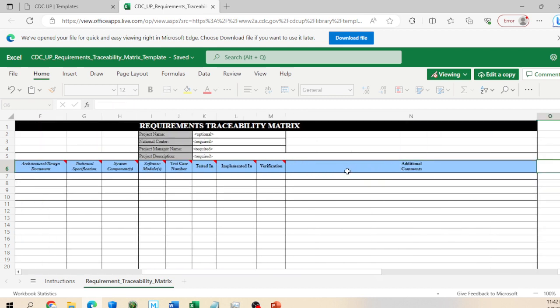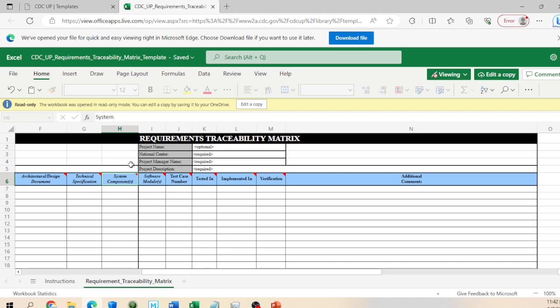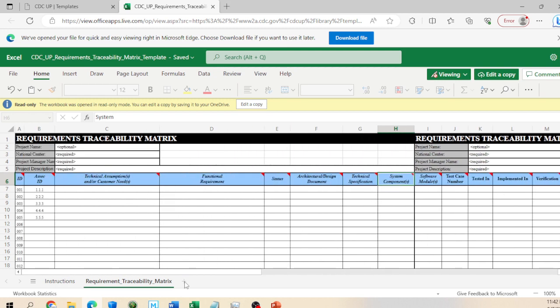And then we want to know who asked for this. So we can actually insert a column, and you could call it requester, for example. If I was able to edit this, I would have added requester, because that's a very important one. You want to know who requested it. You want to know who verified it internally, and you also want to know who validated it, like the customer, the stakeholder, or so on. And you're doing this for each requirement.